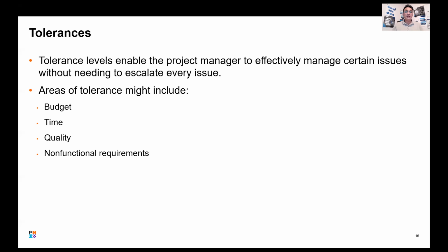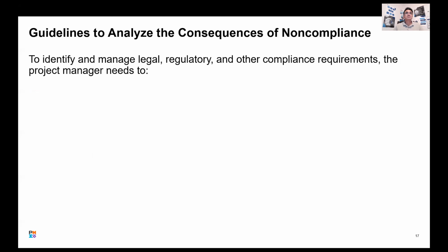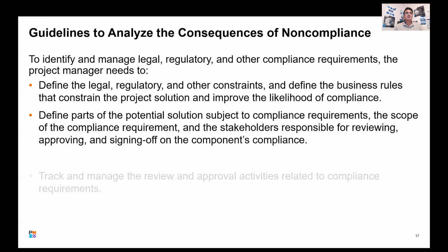Depending on your project plan and dependencies, have you heard about this word buffer? You put a buffer in your plan. That's basically your tolerance, right? Let me put a 2 day buffer in the plan, because I can tolerate a delay of 2 days without impacting my end project deliverable. So that's what it is. Okay, some guidelines there for you guys.